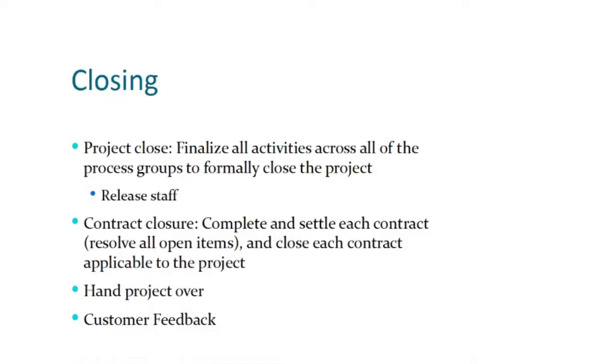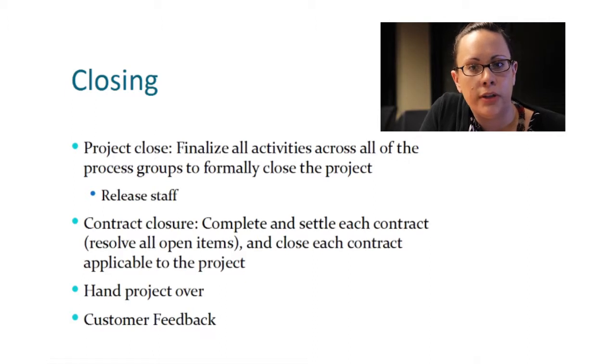Project managers are responsible for several different aspects of the assigned project. Perhaps one of the most important aspects of the project is the final stage known as closing the project. Closing the project involves several steps. The most important steps when closing a project include releasing the resources, ensuring you and your team have met all of your contractual obligations, handing the product to the client, and following up with the client at a scheduled date. Once the client has signed off on the project, your project has officially ended.